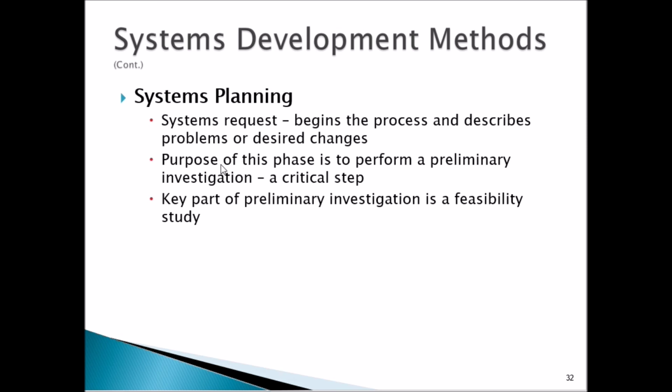That being said, the purpose of this phase is to perform a preliminary investigation. This is critical. And the key part of the preliminary investigation is a feasibility study, and that's to see if this project will even be worth it. It might not be. There's a lot of considerations that go into the feasibility study.